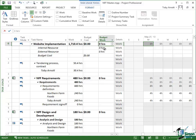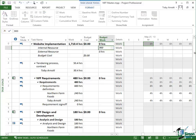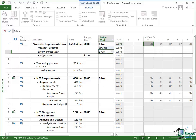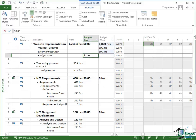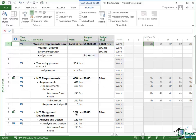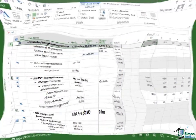So in Internal Resource, I put my 900 hours in there, so I just type 900. In External Resource, I put 900, and in Budget Cost, I put 5000. And now you can see against the Project Summary Task my budget figures. My budget for this project is $5,000 of cost and 1,800 hours of work.